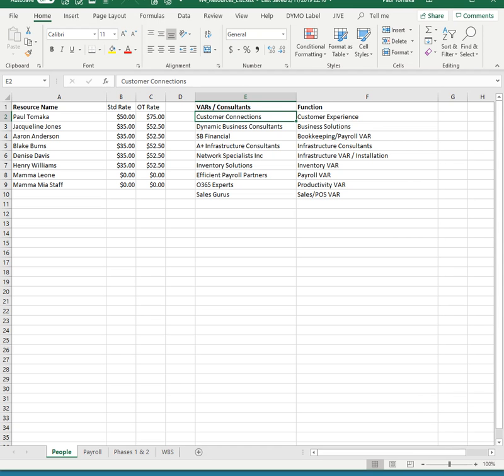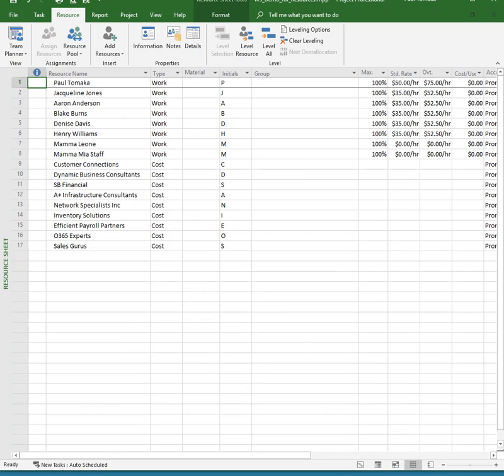So we're going to do it the way we normally would do it in business, where you order stuff from a vendor and you just include the total cost. And then in your project file, you could link the contract to it so that you could look in the contract and see what you actually ordered. If you have this all built somewhere on SharePoint or whatever, you could just link all those files to it. So the end state of all this is you have your resources over here, your vendors over here, plan it all out in Excel, and then all you want to do is translate that here into Project.